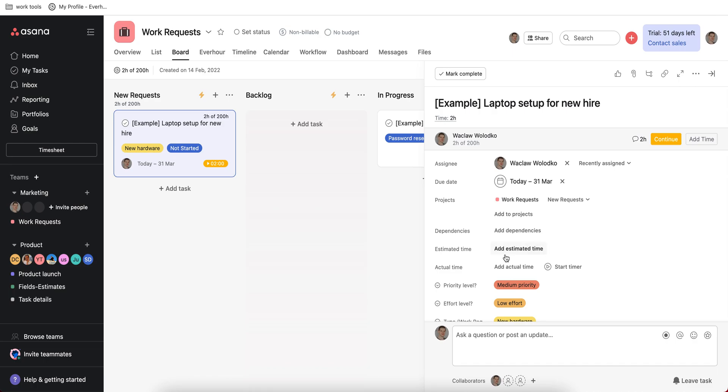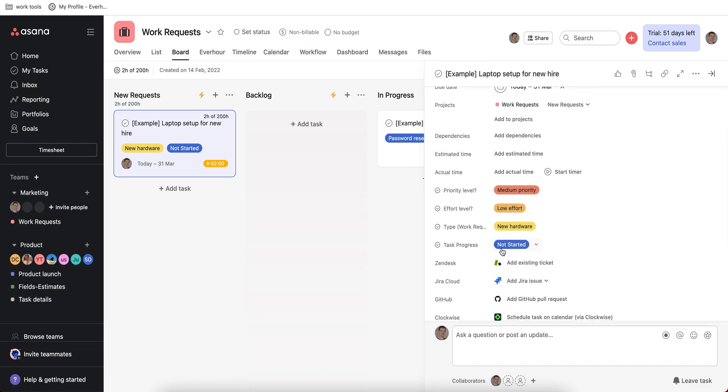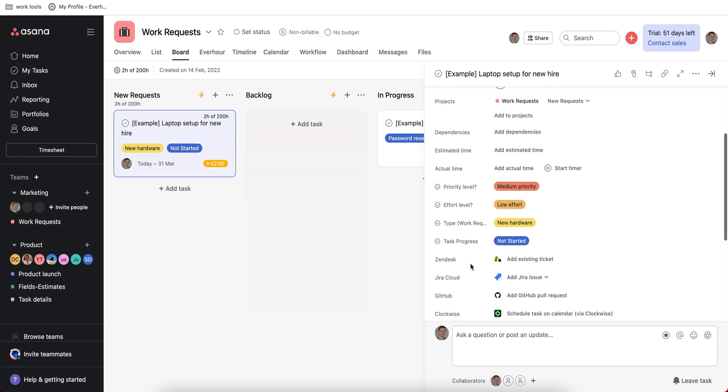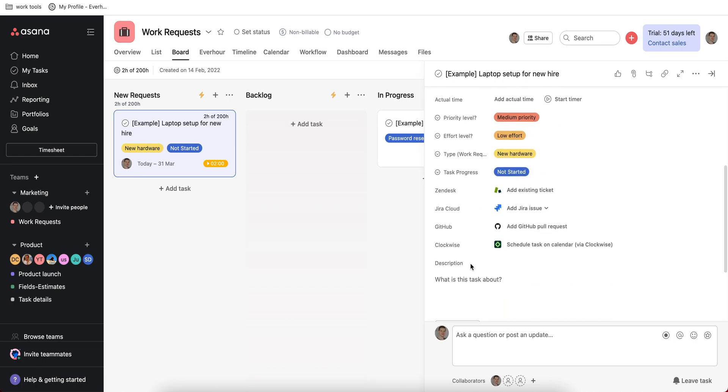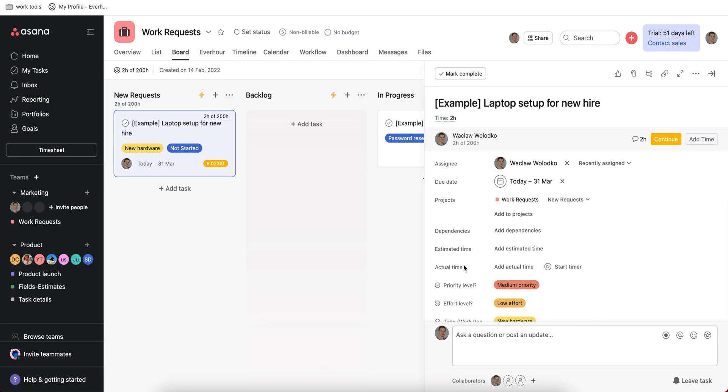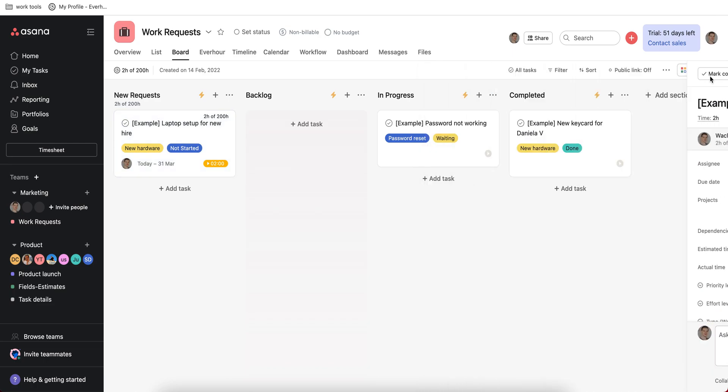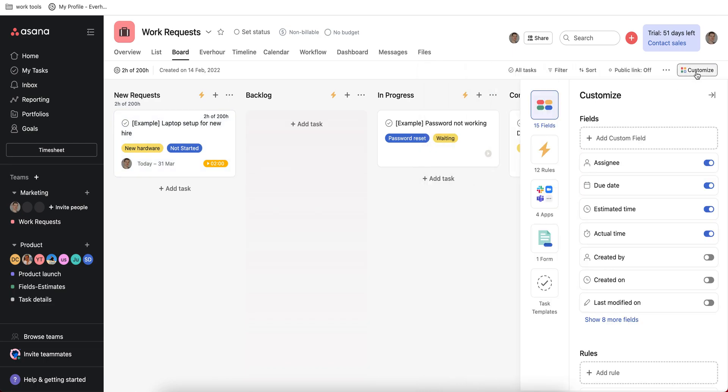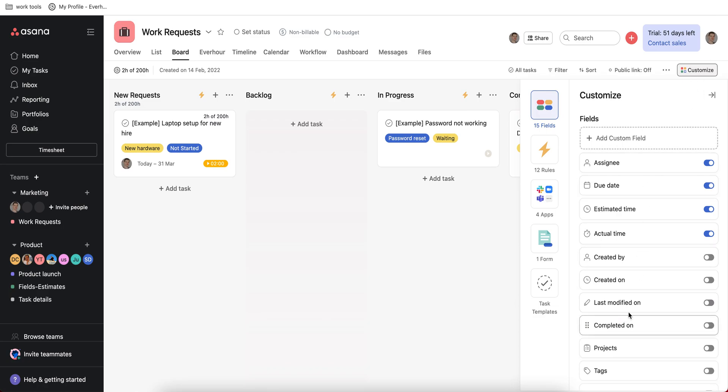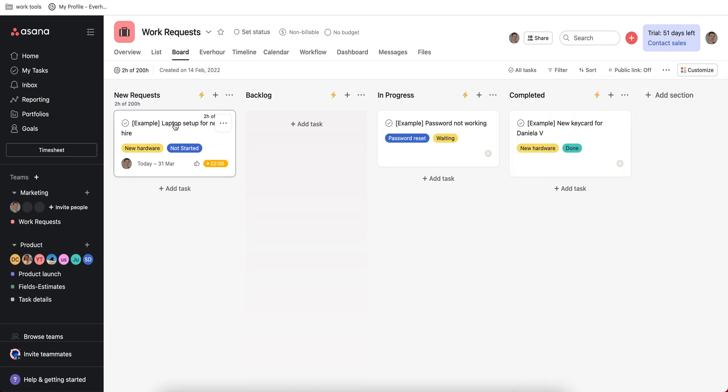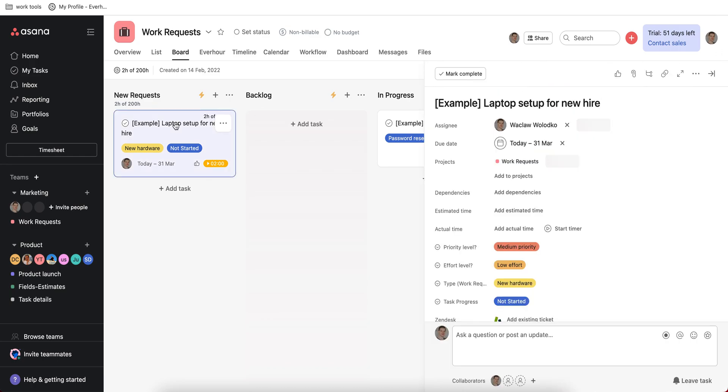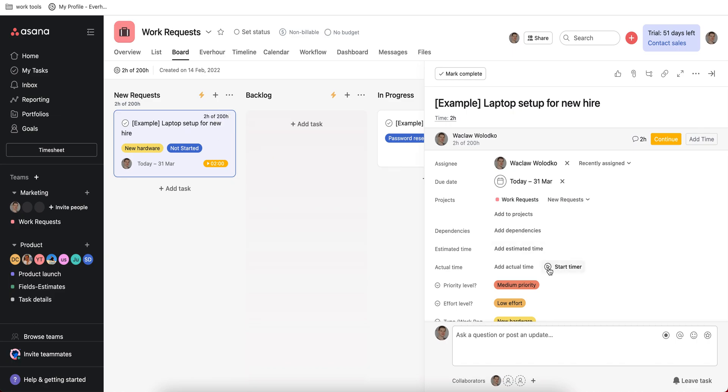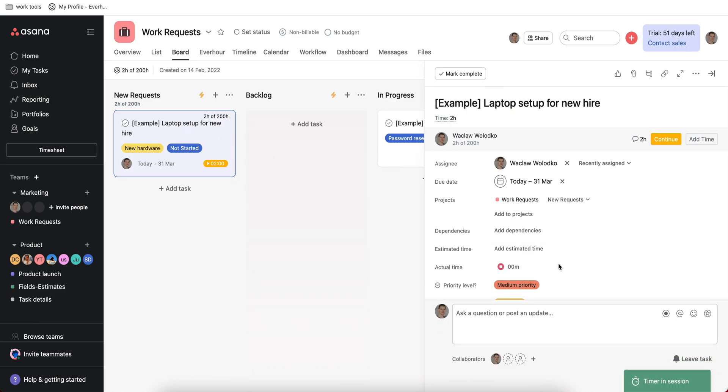As I mentioned, a task may have different custom fields and they make the work much easier. One of the fields I find particularly useful is the field that allows you to track time. It's very important to understand how much time you spend on different tasks, especially if you sell this time to your customers. So if I go to the field section I can add time as a custom field to this project and then I can open my task and start tracking time.